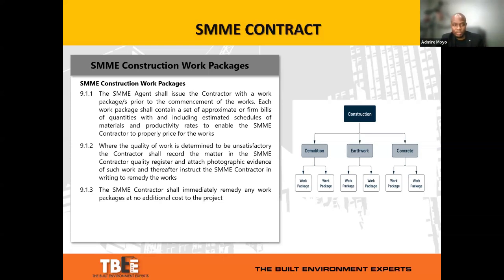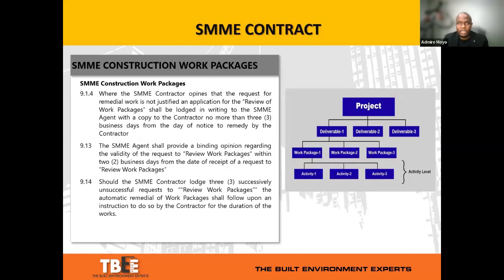If there's any need to remedy any work, that work is remedied by the SMME contractor at no additional cost. Where the SMME contractor is of the opinion that the request to remedy work is not justified, an application for the review of a work package is then lodged with the SMME agent, and we go through that process of the SMME agent adjudicating.